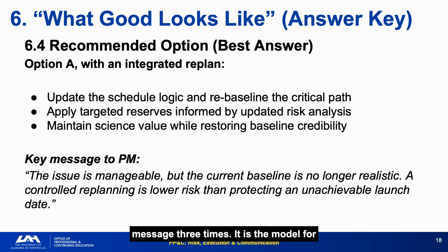Read this key message 3 times. It is the model for every difficult assessment briefing in a PP&C career. Here is what happened. Here is what it means for the baseline. Here is the best available path forward. And here is why the alternative is worse. That structure works in every program context.